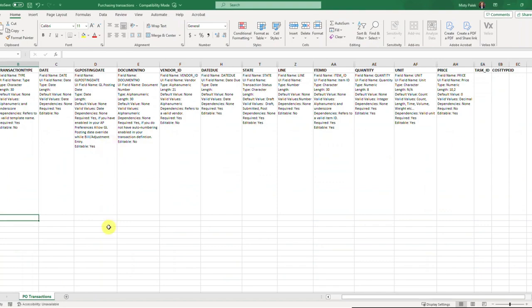So we have this purchasing template and you'll notice that I have lots of columns hidden, and that's because you have the ability to really add those different dimensions or different things that you need to import for. So I've just condensed this to the ones that we actually need to import. And so we would take the data from the estimate export and put it all here. And you could add it all together. You could say, put all the alphas together, put all the ABC electrical together, and you would define the transaction type. So row 1 is always the header.